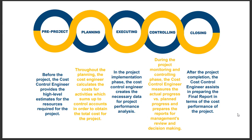In the monitoring and controlling phase — which in most cases runs in parallel with the executing phase — the raw data is analyzed and converted into information to be represented in reports to the project stakeholders. At this stage, the cost-control engineer along with the project management team performs earned value management, obtaining values such as the cost performance index (CPI), to-complete performance index (TCPI), and other key metrics needed for the project.